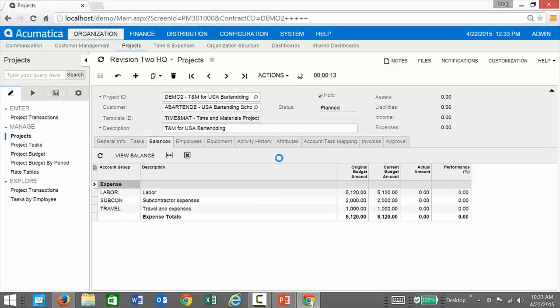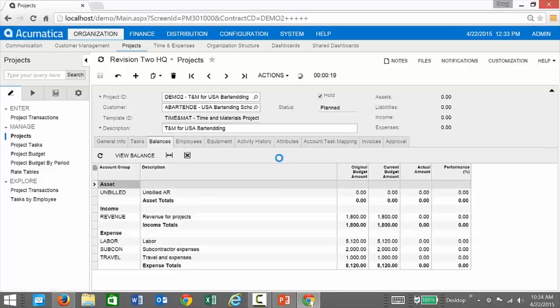It's going to go basically through task by task, pretend it's creating timesheets, and then add the totals to the projected revenue for this project. So I'll just give it a second while it does that. As you can see, the project's expecting to make $15,300 on $8,000 worth of expenses. So overall, this seems in line with what I was expecting.